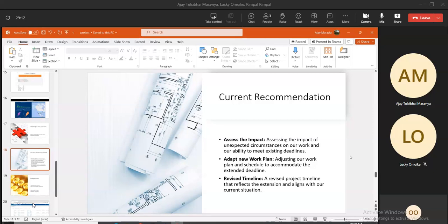We estimated that, but as at now speaking, we have done about 50 hours of work on this project, and it has cost about $1,500 so far. So we are trying to ensure that we not only stay within our timeline, but we also stay within our budget, so we do not exceed the budget.